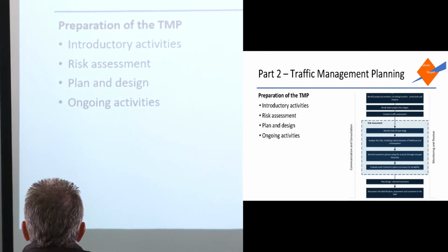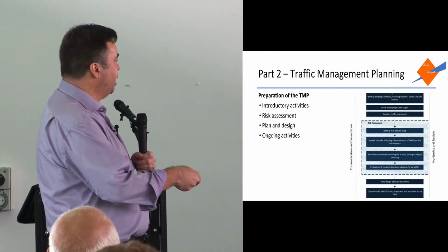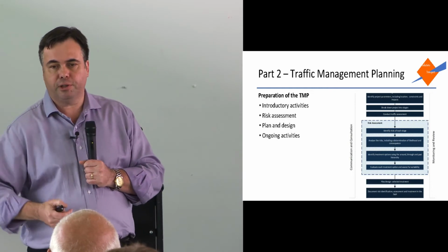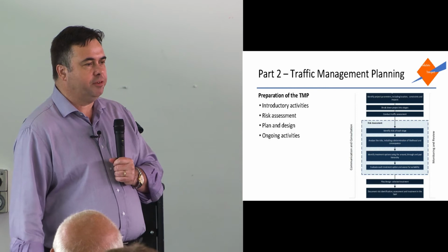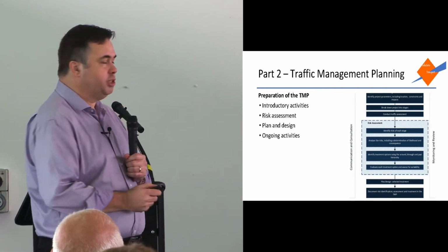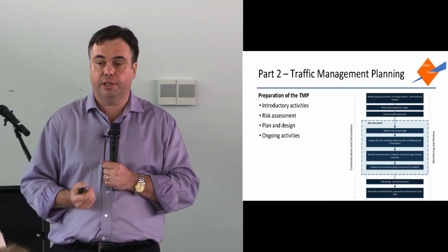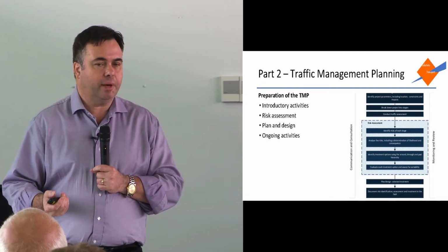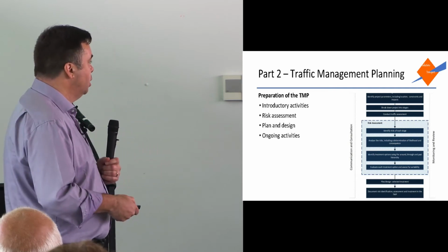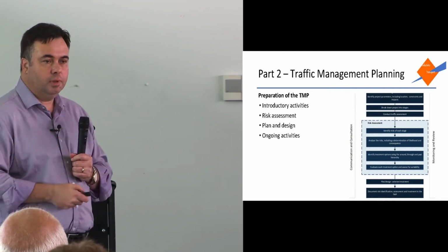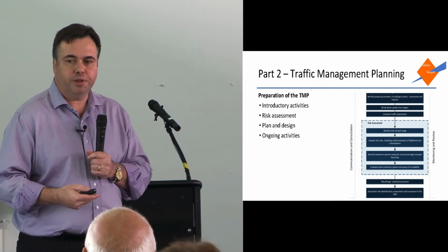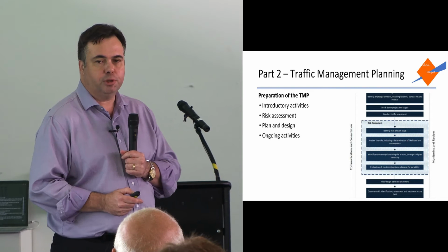So when developing the traffic management plan, what should you do? There's some introductory activities that you need to undertake. What I always say, if you hire me to develop a traffic management plan for a job, what would be the best way for me to identify the issues on the job? Visit the site. So that's one of those introductory activities. Familiarise myself with the site. Familiarise myself with what it is that the contractor needs to do. It's no good me coming up with a traffic management plan for a repaving job when it's actually a drilling rig. Know what the job's about. Know how the contractor wants to do the work. So you do all of that. You then do a risk assessment. That's what I was just talking about. Identify all the risks. Once you've evaluated each risk, you've got the options, you've got your preferred outcomes, then you can develop up your traffic management plan.